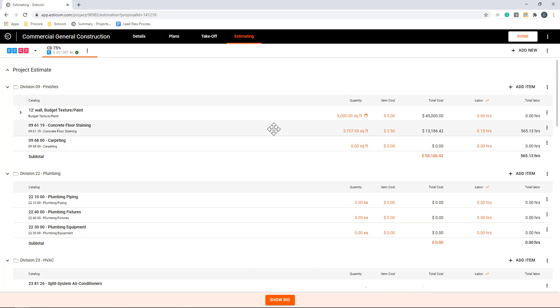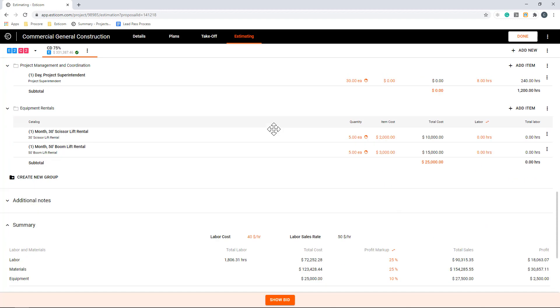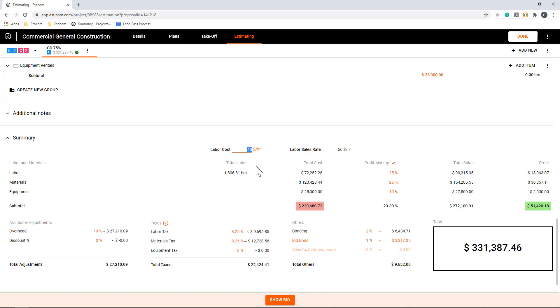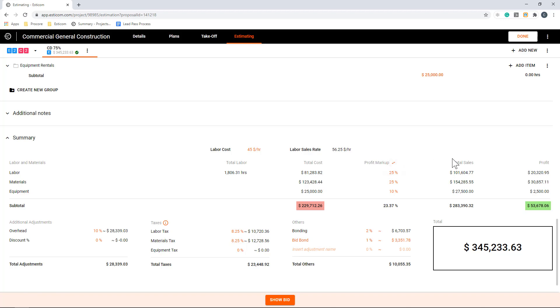Below the takeoffs, we have our summary section where the project costs are summarized and broken out by cost type. So for example, labor, material, and equipment. Here you can see the total labor hours and our variable composite crew rate with burden that we can adjust on a per project basis. This hourly rate is a crew average that is multiplied by the hours to give us an estimated project labor cost. To the right of the cost breakouts, we can add project markup or margin depending on your company's preferences. To the right, you can see the project costs and profits and below the totals.